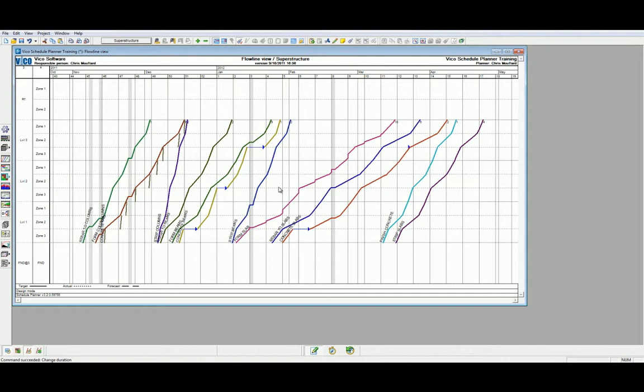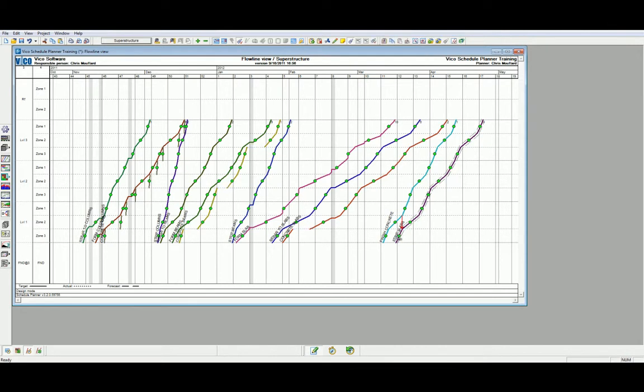one floor completing before the next floor above can start and be completed. Start by selecting the dependency links tag, selecting the strip slab task, drawing a dependency line.